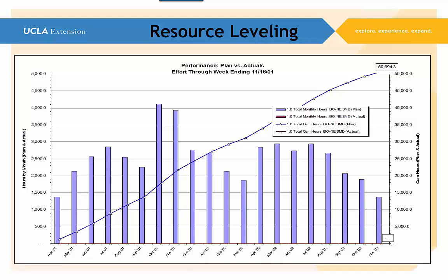And it's interesting because to understand the scale that we're talking, a rule of thumb, one FTE or full-time equivalent in a year has 2,000 hours. So if we're going from one month to another month and we're actually increasing our staffing by 700 resource hours, and there's only 160 hours in a month in the planning month, that says that we have got a lot of people coming on board. Or look at the difference between September and October. September is 2,300 and in October is 4,100. So that's almost, in 1 month, we're almost moving 2,000 hours. So that means we're putting on almost 12 people in 1 month.